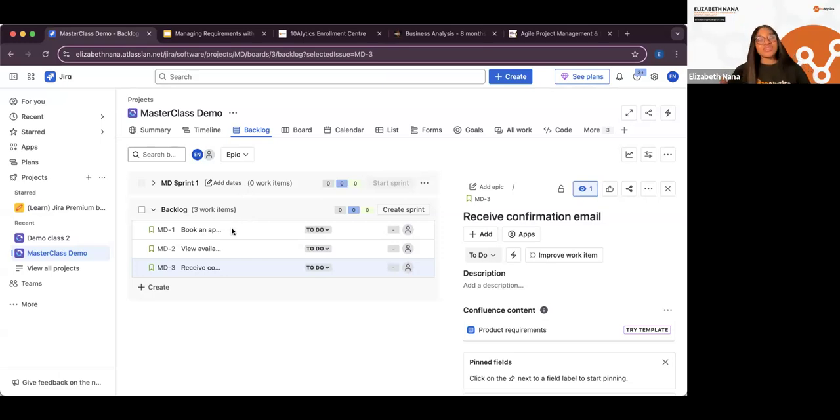Adex says, oh, Adex, that is not a user story. Remember, we have talked about the format. As a patient, I want to, so that I can. So that's how you have to write it. If you just say get email notifications, that is not a user story. Your developers are going to ask you, I don't understand, who is getting the email notification? Am I getting the email notification? Is it you that is going to get the email notification? So you see, that's what we mean by poorly defined requirements. It's going to be confusing.